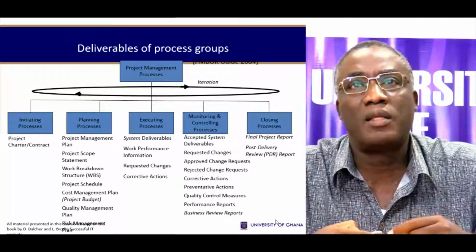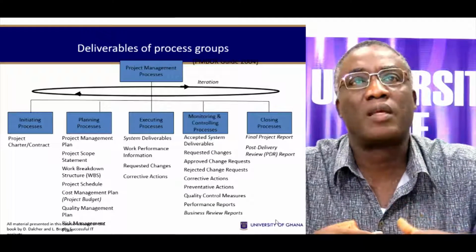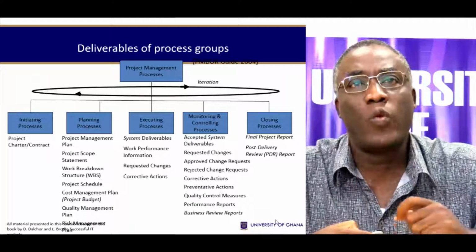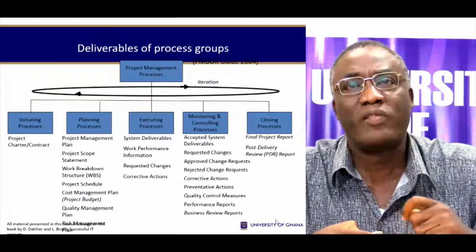Then the executing processes. What are the deliverables there? System deliverables, work performance information, requested changes and corrective actions.